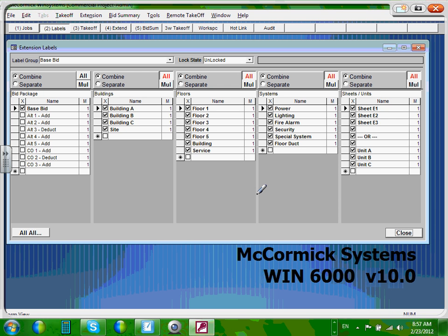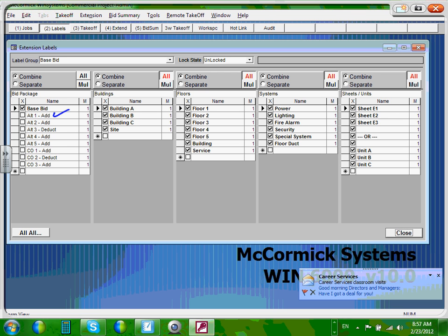My best bet, guys, is when it's exactly the bid. I'm going to add all the material, labor, add the profit, overhead, and come up with a $2 million to build, to do a building electrically, right? To install the system. That's your base bid. Okay. Now, what happens if you need to add? You can add something or you can deduct something. We're not going to do add deduction.